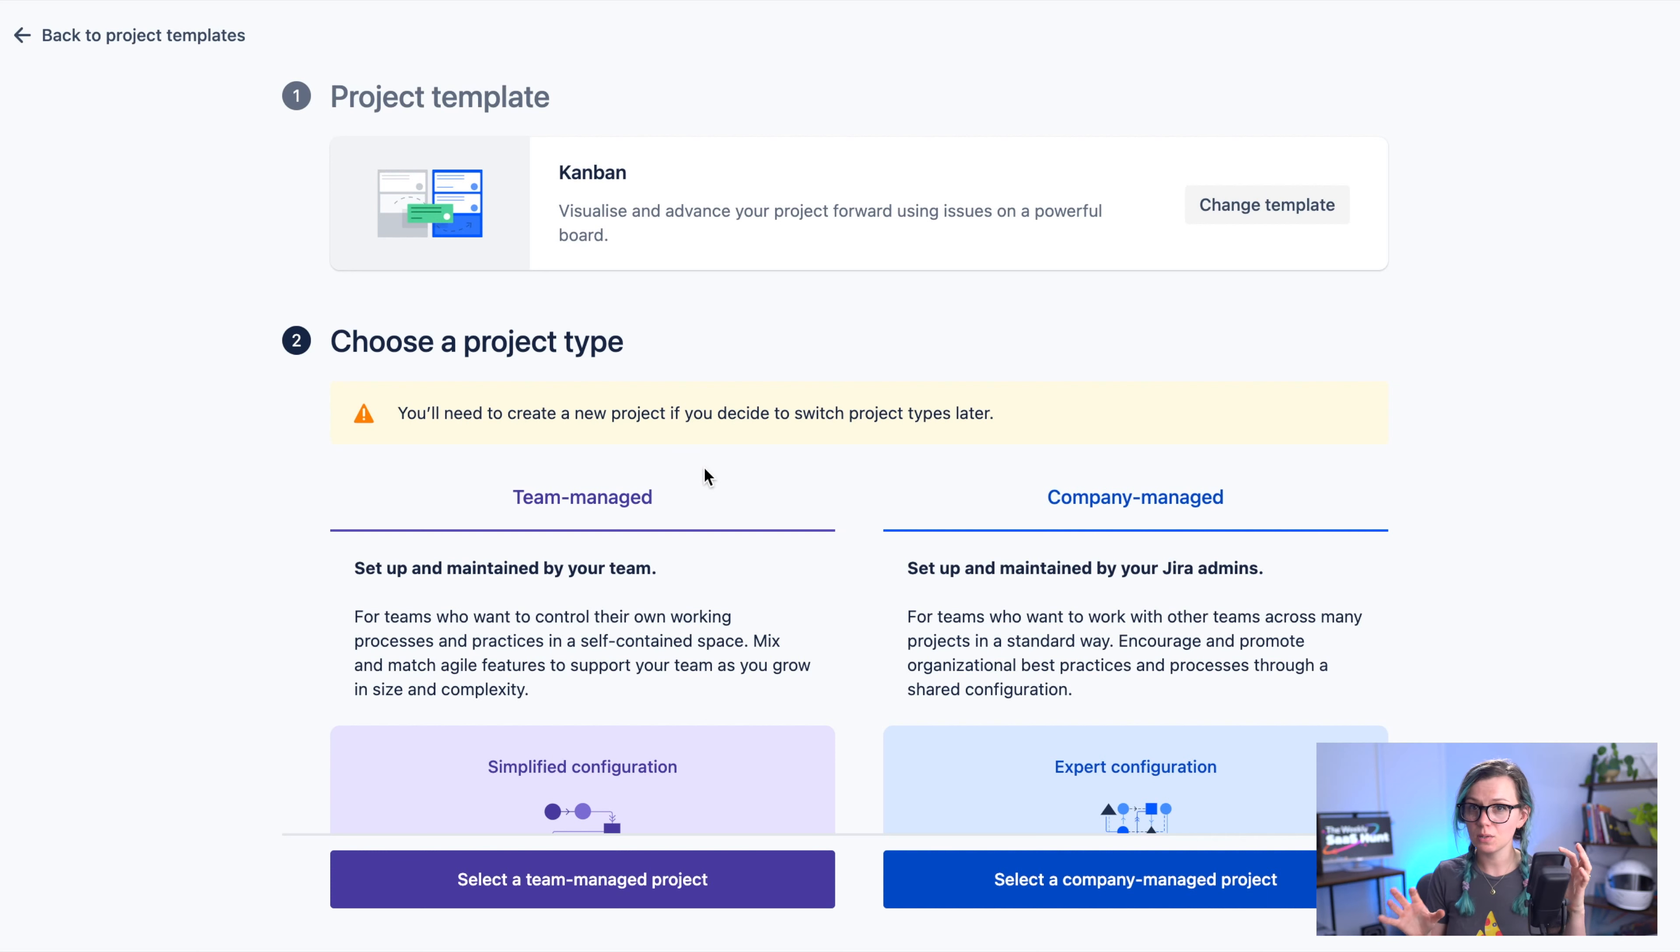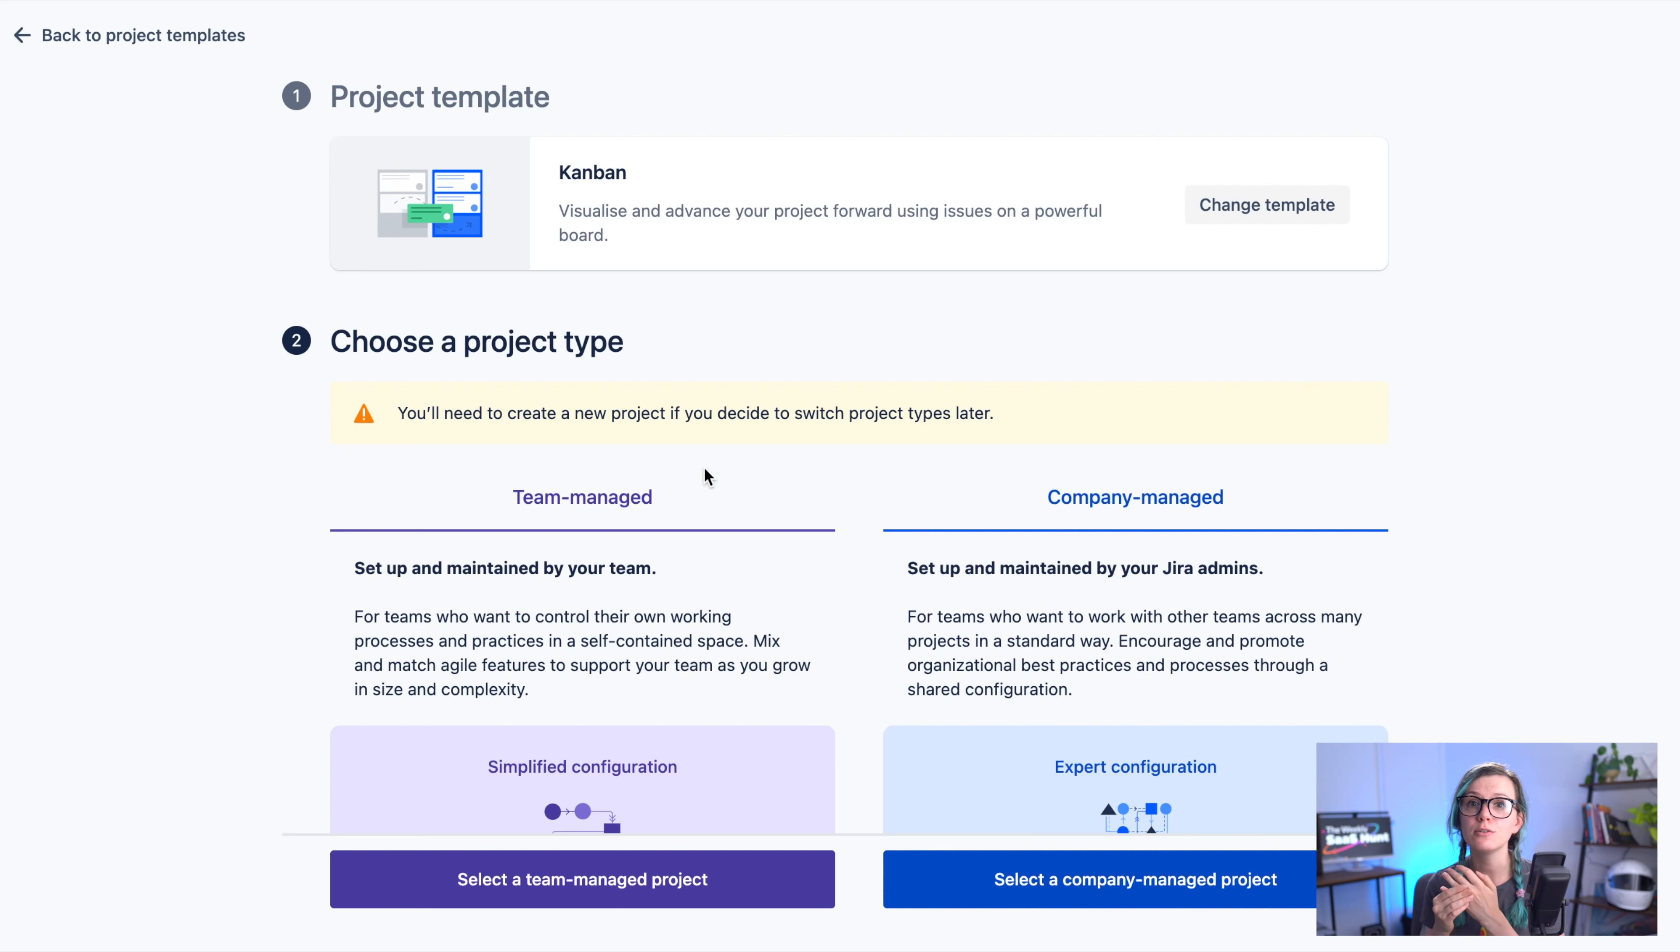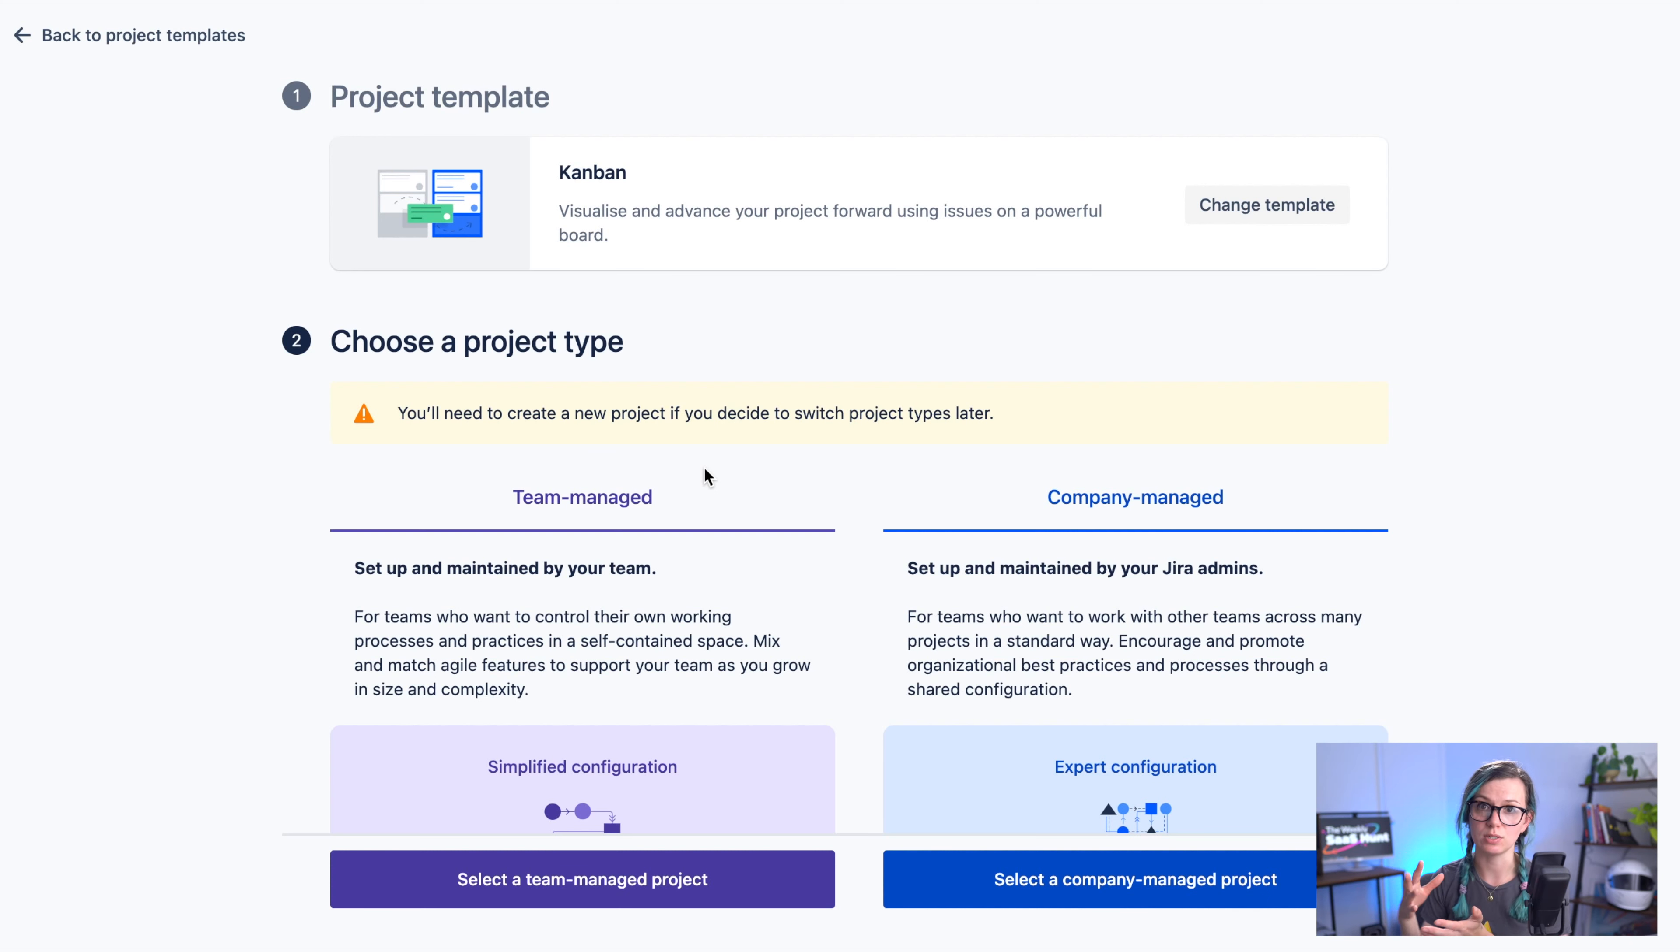The difference is quite simple although they sound very fancy so with a company managed project you have a global configuration for these projects so for example if you would like to have shared issue types or workflow that you would like to reuse and then add in multiple projects you would go with the company managed one. It's slightly more advanced for the configuration but it definitely is worth it if you are a larger organization and you want to keep your project configurations in sync.